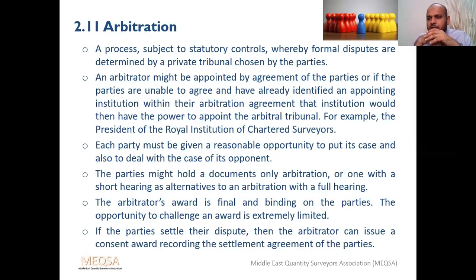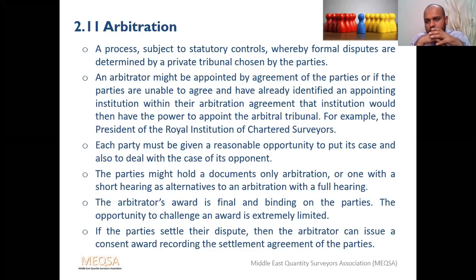If not, each arbitrator will have a different opinion. The chairman will decide whom he is going to vote with. Whoever the chairman decides with, that decision will be binding. Out of three, two signatures are well enough.